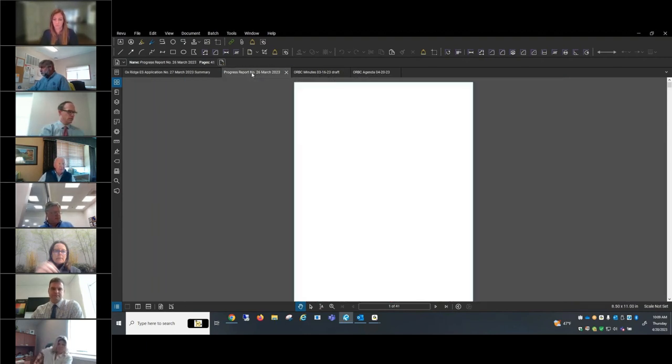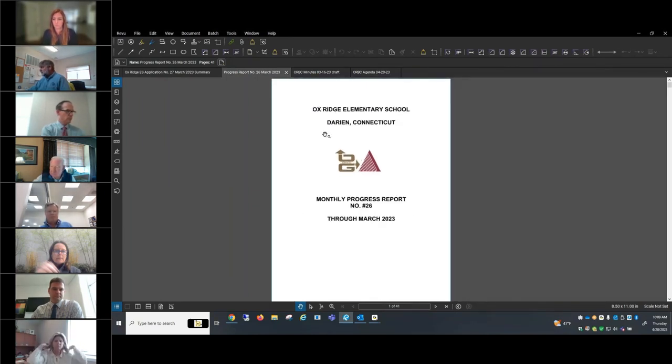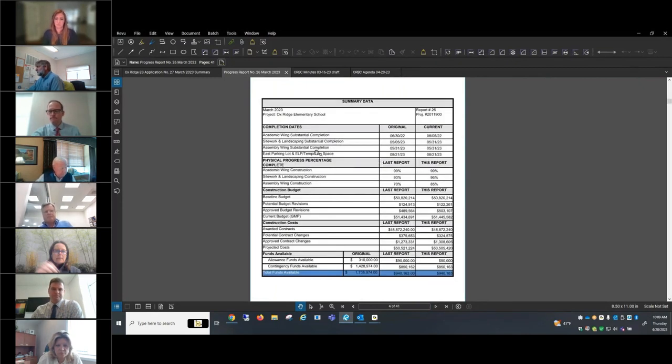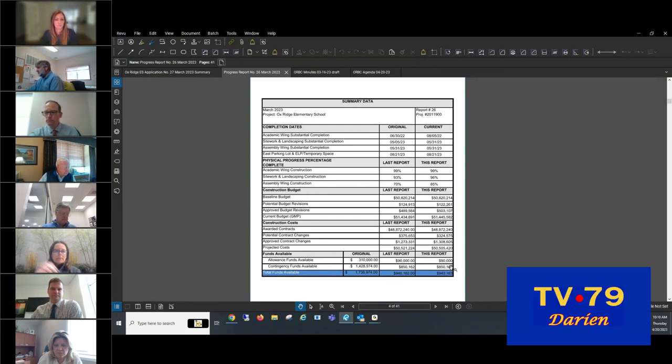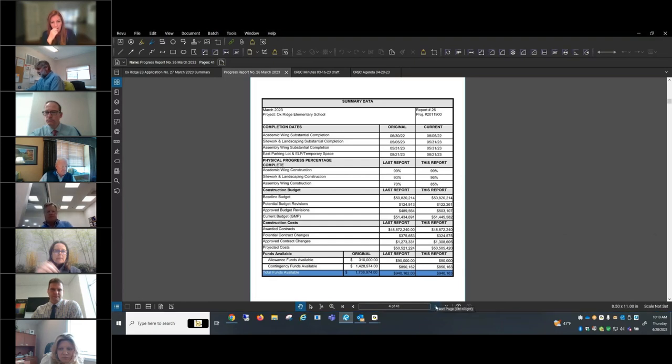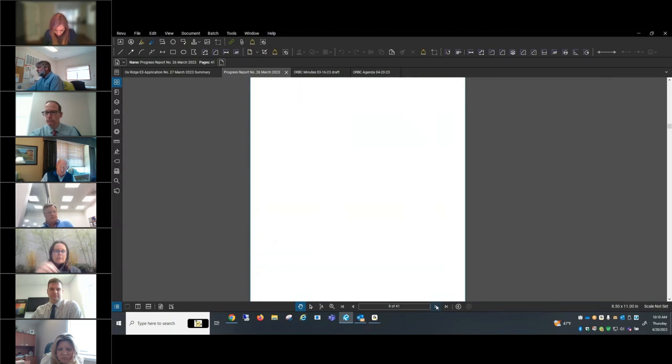Progress report number 26 through March and up to date. George and David. This is for March. The summary data, we're showing substantial completion at the end of May, and then the east parking lot and the LEP outfits in August. We have percent completes. We did approve some PCOs, and we'll get into that a little more, but our contingency hasn't really changed much. We're still at an $850,000 contingency, and then $90,000 balance in our allowances. So we're about $940,000 between the two, which is obviously still very healthy at this point in the game. Financials.